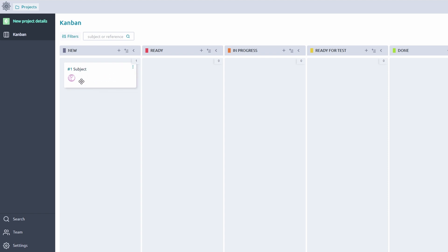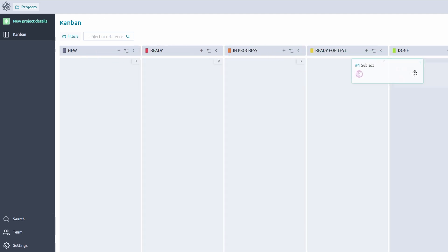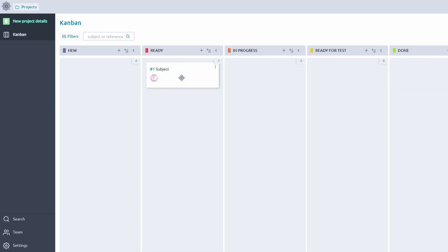Taiga's drag-and-drop interface makes it effortless to track progress. Move tasks visually across columns as they advance through stages. For example, drag a task like Write Blog Post from To Do to In Progress once work begins, and then to Done when it's completed.